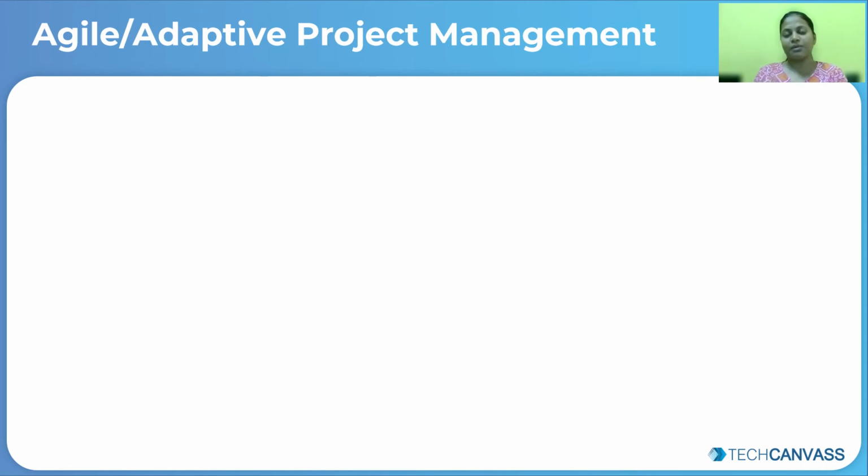So we came up with another concept, which is agile or adaptive project management. Say, for example, I know that to build this product from the beginning to the end is going to take me 6 months. Instead of releasing the product after 6 months, we divide the work into, say, what we want to achieve in 1 month, and in that month we go by weeks. Every 2 weeks, which we call an iteration or a sprint, we produce something, and then we get it to production.